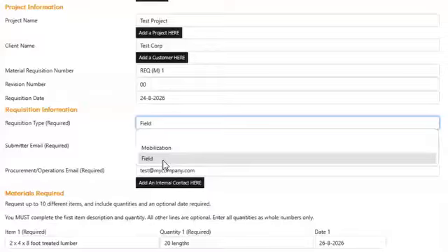Likewise, let's say you're doing hydrovac like we do sometimes up here in Canada to avoid underground services, and you didn't know before you started the project that you were going to have to hydrovac. When you're doing concrete work in hydrovac holes, you tend to use a lot more concrete. So then you can send your customer a note or a letter or a notification of intent saying, look, because of us having to do this, it's using a lot more concrete, so there's going to be an additional charge for that concrete, which we'll know when we're finished with this area of work. Okay, I need to get hold of my client and let them know about this issue or whatever it might be.